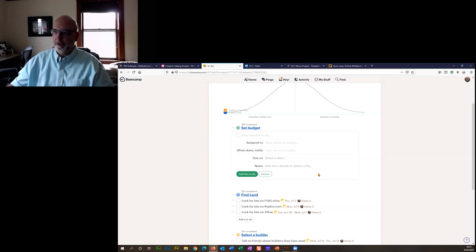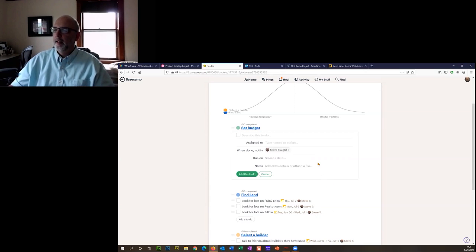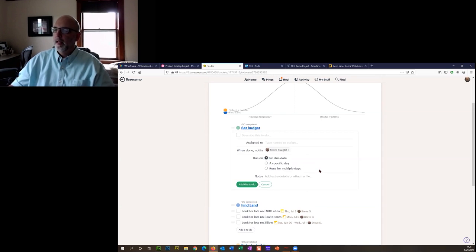And Laura, I believe it was you had asked the question, where do we do the assign to? And here you have that option to do an assign to. So we're going to assign this to you, Laura. Now, the only thing is I did forget, you have to build a team first. And so since there is no team built at this point, I'm the only one on it, I'll just assign it to myself. When I typed in Laura, I didn't see a Laura, so it just ignored it. So you would have to go in and set up your team ahead of time.